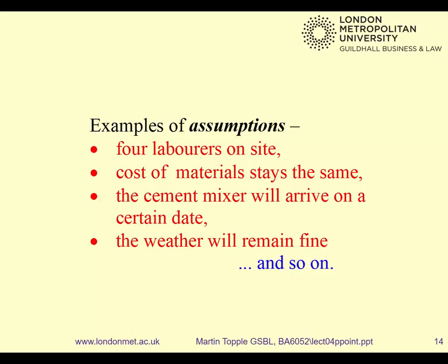And each project has its own assumptions. So we will have assumed, for example, that 4 labourers will be on the site every day. Now that assumption means the project can proceed at a certain rate. If you had fewer labourers than that on the site, what would happen? Probably slow it down. And if you had more labourers than that, you may well be able to speed up your project. It might not be your decision.